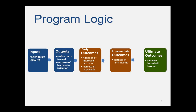Our monitoring data captures inputs and outputs and tracks some outcomes such as adoption of new techniques. When we're looking at inputs, outputs, and even some early outcomes, MCC did very well. The average completion rate of targets was 103% in Ghana, 103% in Armenia, 112% in Nicaragua, and El Salvador and Honduras were all well over 100%, reaching 125% of targets.